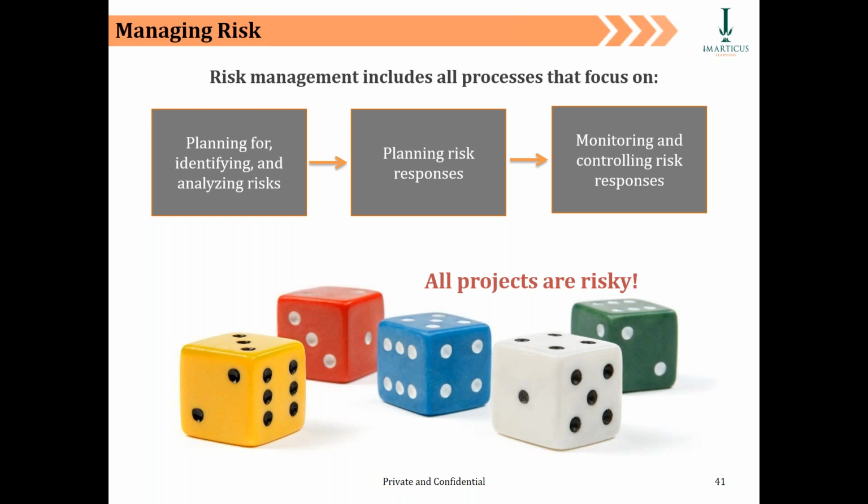So, publish some kind of a risk register, some kind of a risk dashboard, where you clearly bring out the risks related to the project. For example, SMEs from the business side are not available for any discussion. It's a huge risk. So what is the plan you have? What is the plan B? What is the backup plan? Maybe plan B is that we will have to rely on the documentation on the client side. Of course, we read one of the golden rules that human dialogue cannot be replaced by good documentation, but the fact is, you have no choice. So either you keep crying over this risk, or you go ahead and plan a plan B.